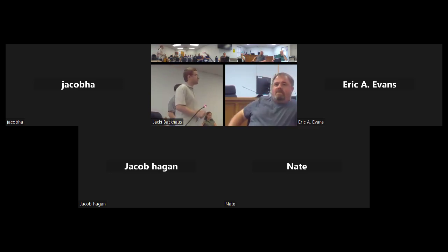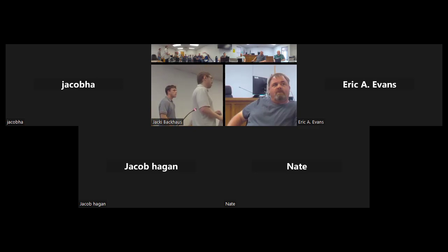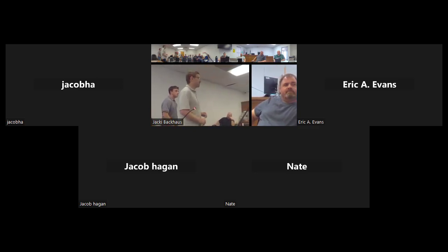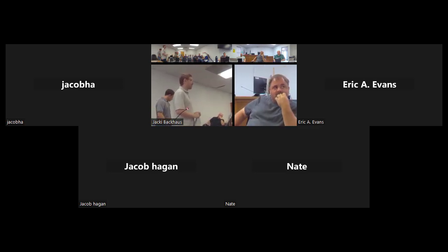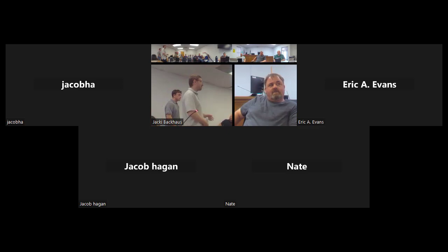What's the objective today, to decide which one to send bids out on, or are you gonna send bids out to all? We want to decide which one we want to do. Today, we could bid them all out if people were interested, but it'd be more expensive because right now we have designs, we don't have construction grade plans.